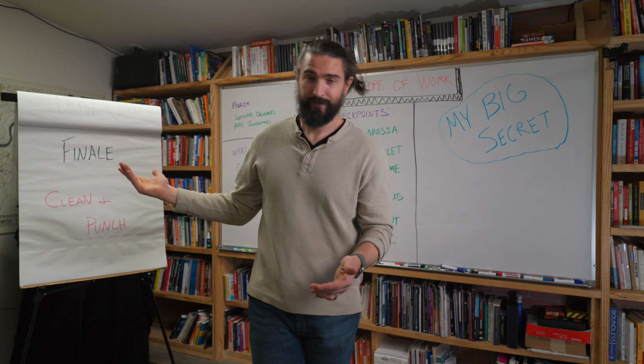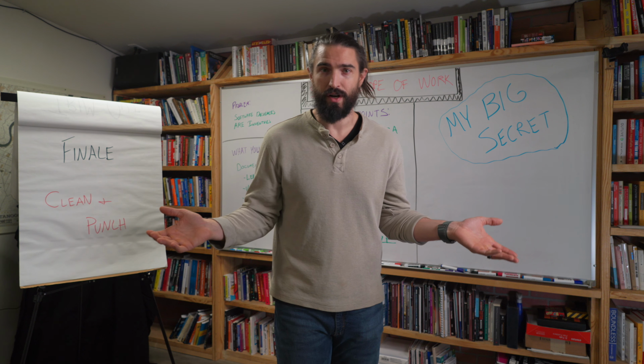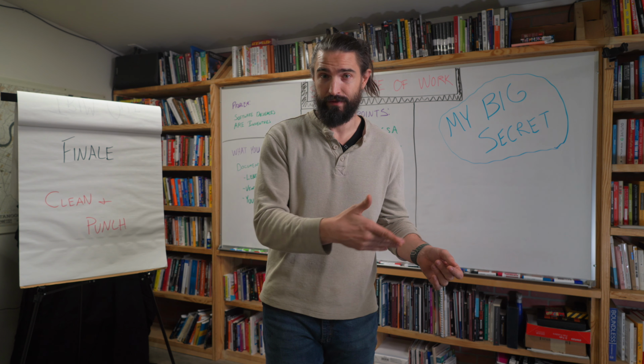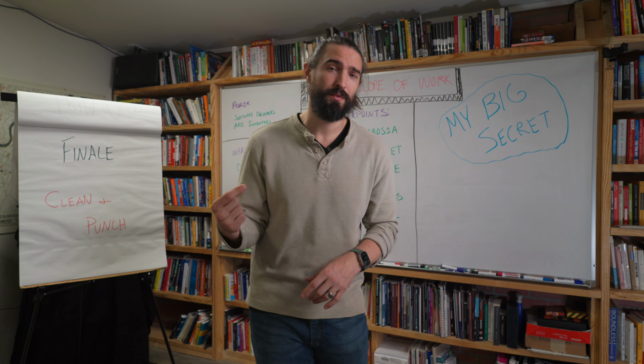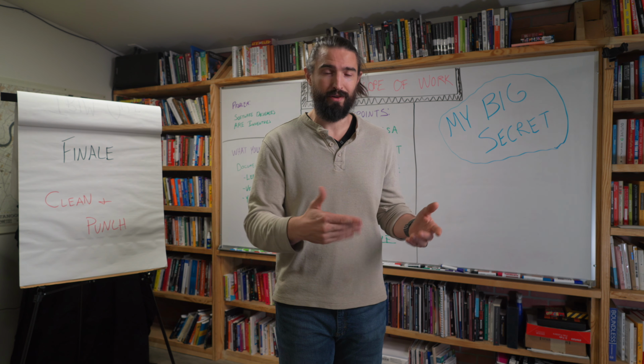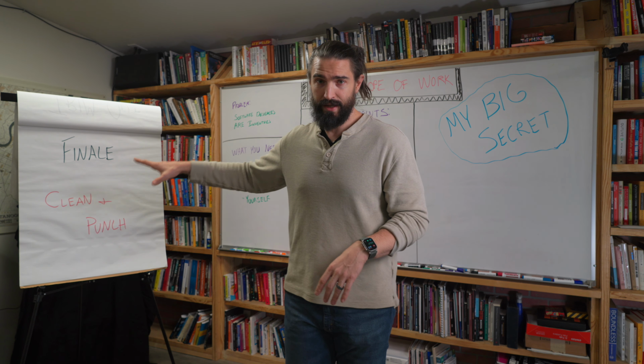And finally, the finale. This is where you're gonna have a cleaner come in, do the construction cleanup and the finer clean for market if that's what you're doing. This is also where I always put a budget for handyman repairs because you know some punch list items are gonna come up. You also know that if you're selling the house, an inspection checklist is gonna come, an inspection resolution where the buyer gets an inspector to look. They're always gonna find something. So I make sure to leave a little bit of budget in here and make sure I leave a line item knowing that I'm gonna have to come back and do that.